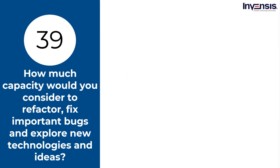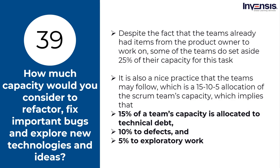Scenario question: How much capacity would you consider to refactor, fix important bugs, and explore new technologies and ideas? The team commits sprint items according to available capacity when planning the sprint. To achieve optimal execution, the team should devote between 80 and 90% of its overall capacity — anything higher will impede performance. Bugs, refactoring, and research all need regular attention to avoid accumulating technical debt. Some teams set aside 25% of their capacity for this task. A good practice is a 15-10-5 allocation: 15% for technical debt, 10% for defects, and 5% for exploratory work. If the team can stick to these deadlines, it will meet the code quality and maintenance requirements of most software programs.